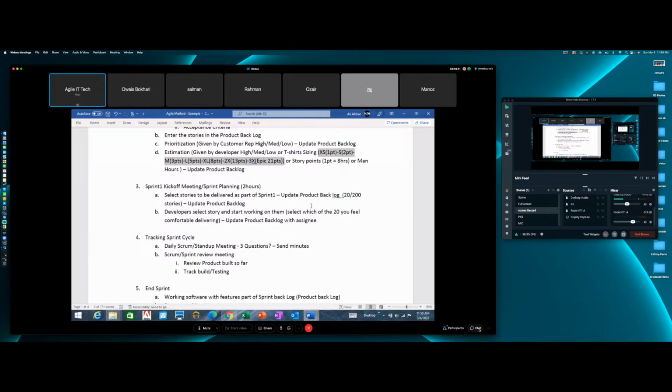And what you do is you give the story to the guys saying, okay, guys, we need to change our transmission. Everybody understand what needs to be done? Does anybody have any questions? No? All right. Pick out the card that you think is the right estimate. So they'll all pick up a card, right? And then you would tell them, okay, show me the card.